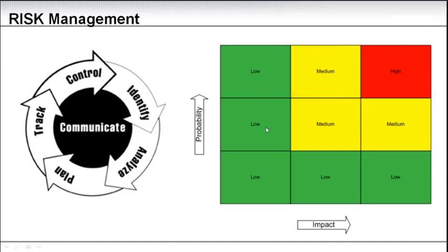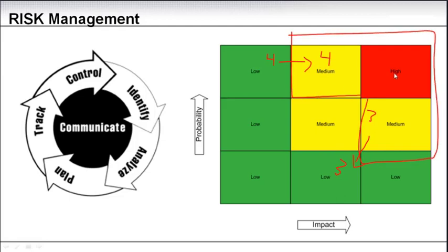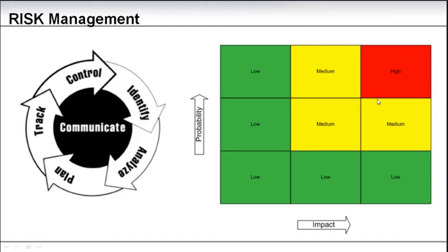Now you can use this chart to track the risk. So risk number 4 might be low. The week after, it might have moved, so that now the impact is higher as you enter a new phase, or it might be that risk number 3, which was high impact, medium probability, has now moved down to be in this quadrant. So you can track your risk movements and always focus on the risks up here, and you can see which one was up there in the previous period and which one is up there now. I've seen that reporting be very successful.